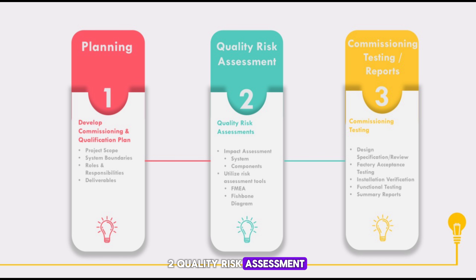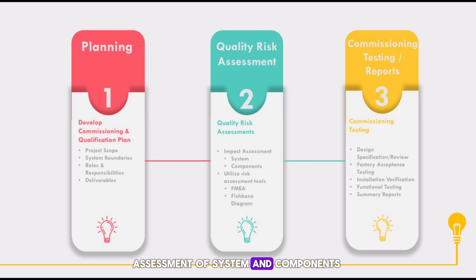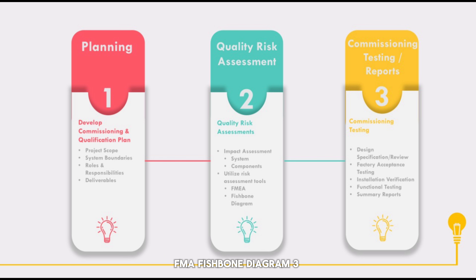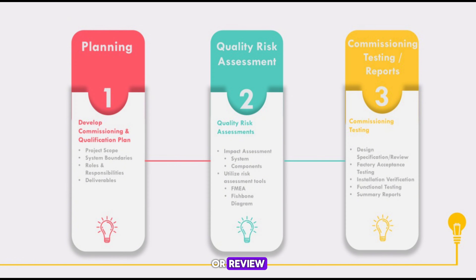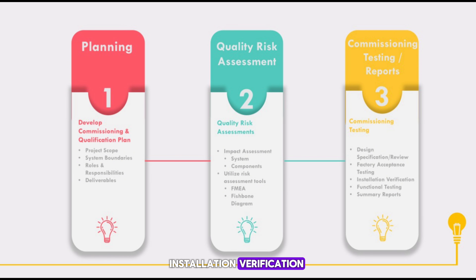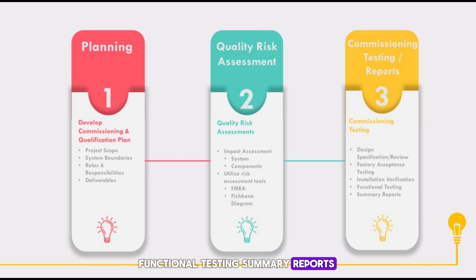Step 2 — Quality Risk Assessment, which includes impact assessment of systems and components, and utilization of risk assessment tools such as FMEA and fishbone diagrams. Step 3 — Commissioning Testing or Reports, which includes design specification or review, factory acceptance testing, installation verification, functional testing, and summary reports.